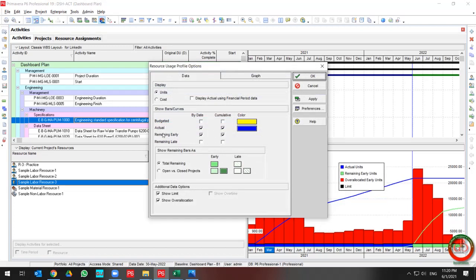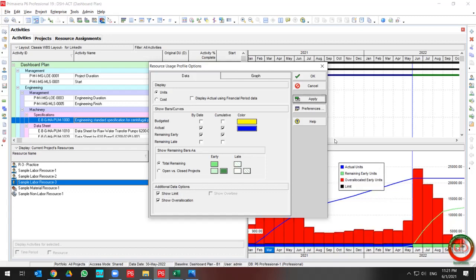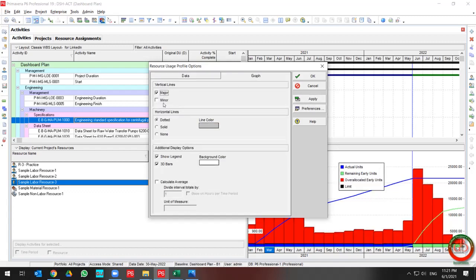In the Resource Usage Profile options, you can select Budget, Actual, Remaining Early, and Remaining Late for both time interval and cumulative data. You can also disable or show the limit and overall allocation, and change the minor or major lines for your curve, or change the horizontal line style to dotted, solid, or none.